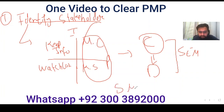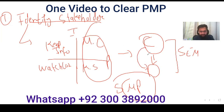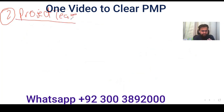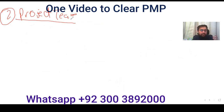You then put a strategy for engaging key stakeholders. You create a stakeholder engagement matrix showing current versus desired engagement levels, and a stakeholder management plan — a complete strategy to move stakeholders from their current state to the desired state. Then you work on your project team. Generally, stakeholders are those affected by the project excluding the project team, though the project team is the most important stakeholder.